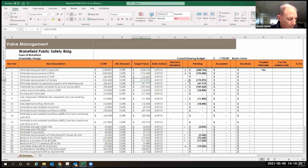GGD issued a memo this week, and it looks like rooftop unit number 2 is undersized. I think in the estimates, it showed that it was going to be replaced like for like, 10,000 CFM, but they're now saying that we need a 17,000 CFM.